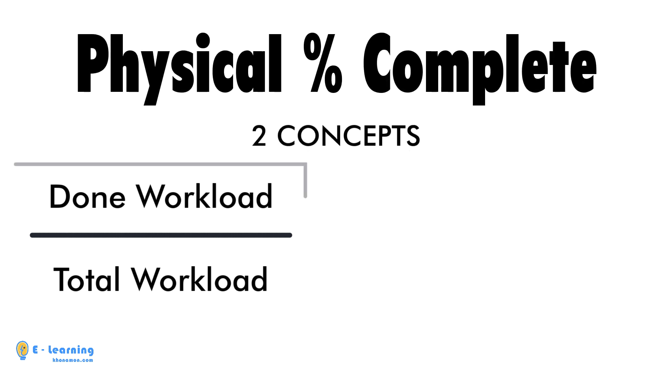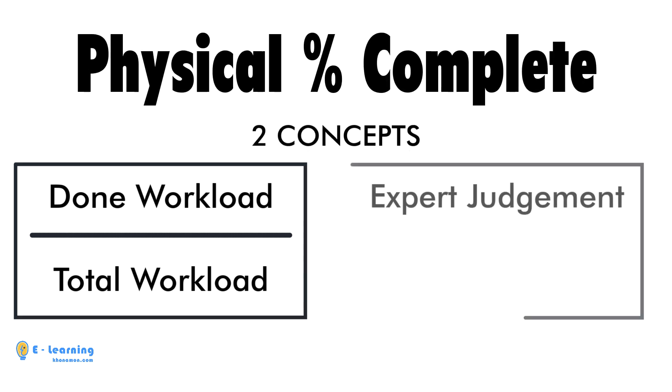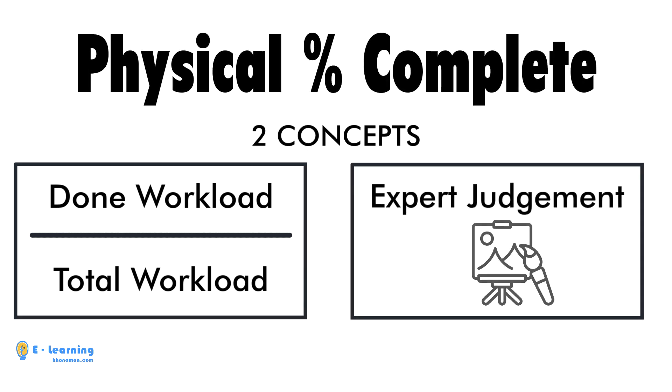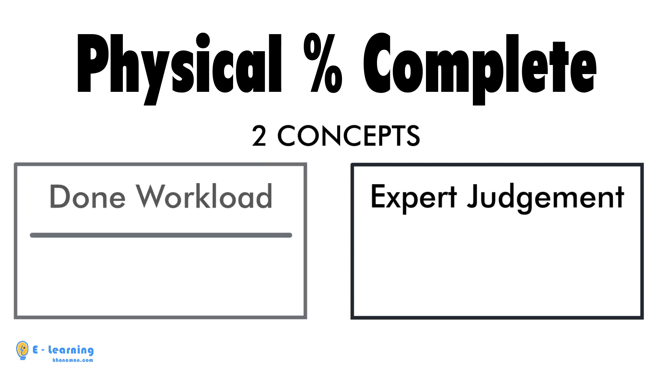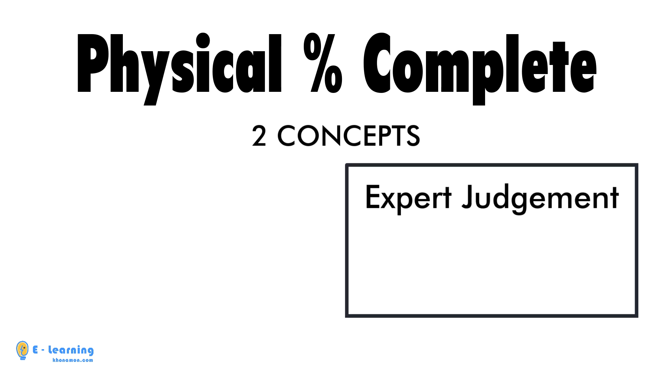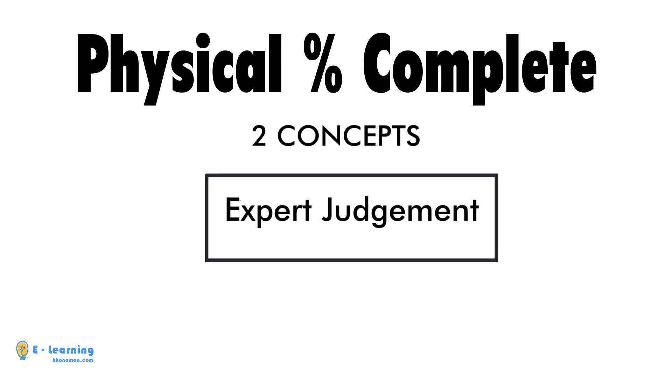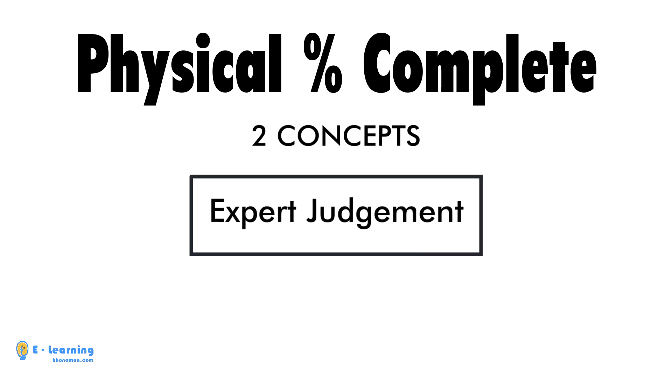The second one is expert judgments. Sometimes, detailed drawings, especially at the beginning of the project, are not ready. So you lack the total workloads of the project. In this situation, you have no way except getting experts' opinions about the workloads.